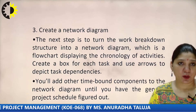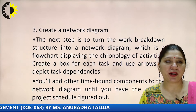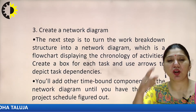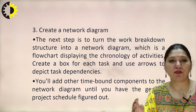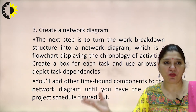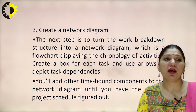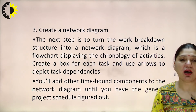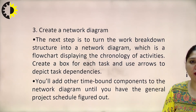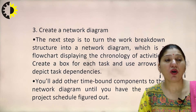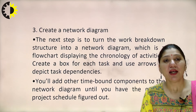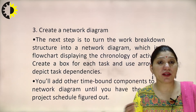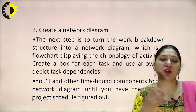The third step is the creation of a network diagram. The next step is to turn the work breakdown structure into a network diagram — a flowchart displaying the chronological order of activities. It is a simple network diagram having nodes and links, with connectivity from start point to end point. We have to create a box for each task and use arrows to depict task dependencies, then add time-bound components until we have the project schedule. We must see all paths from start to end and determine which path is most efficient for project completion.